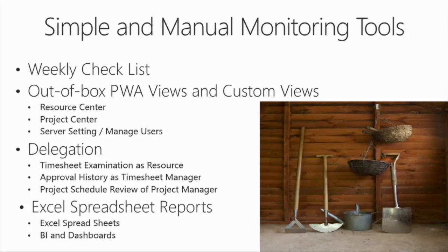A lot of the tools can be just out of the box views. I'll show you some examples. But what I often do, I'll create a view called monitoring projects, and it's usually the custom fields that are optional that you need to make sure that data is being populated. Okay? Very manual. I look at it, I see a blank, I'll send an email to remind someone. You've gone from this phase gate to this phase gate, and in this phase gate, you're supposed to populate these fields. And if you don't, we're going to get inaccurate reports. But that's just creating a simple view within PWA. Same thing with resources.